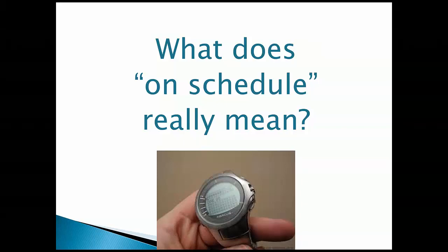If someone says, are you on schedule? I'm going to make sure that I ask the question, what do you mean by on schedule? Are you hitting your dates? Or are you just showing the end date on time? So that's a big difference. So it's very important to know to me, if someone says I'm on schedule, that means I'm hitting my dates and I'm not having to adjust that end date.